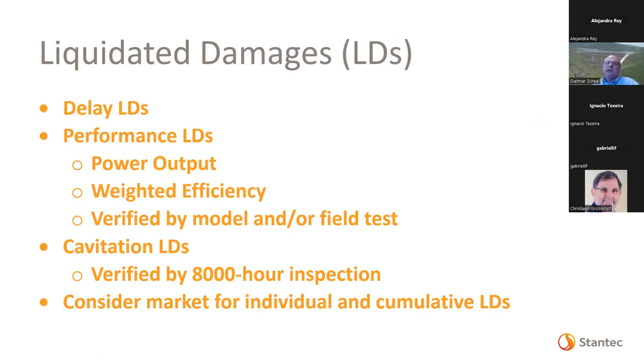You don't want them to be ridiculous. You want a collaborative effort to keep delays down to a minimum. And there are other forms of guarantees, cavitation issues as well, which are measured much further down the road. And I mentioned the bottom already. Consider market and individual, for individual and cumulative LDs. Again, we can't be bankrupting contractors. That does you no good.